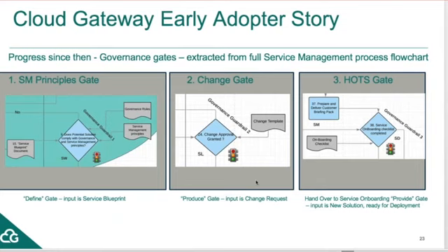The gate is there to say, have we considered all the things you would in a normal ITIL change record? Cost, resources, risk, business impact, and so on. And the output of this will be that we start to populate our RAID log. Now, if there are any risks identified at that point, and with a potential new product or potential new customer there were, that's when we start to populate the RAID log, which we then use for the rest of our journey as well.